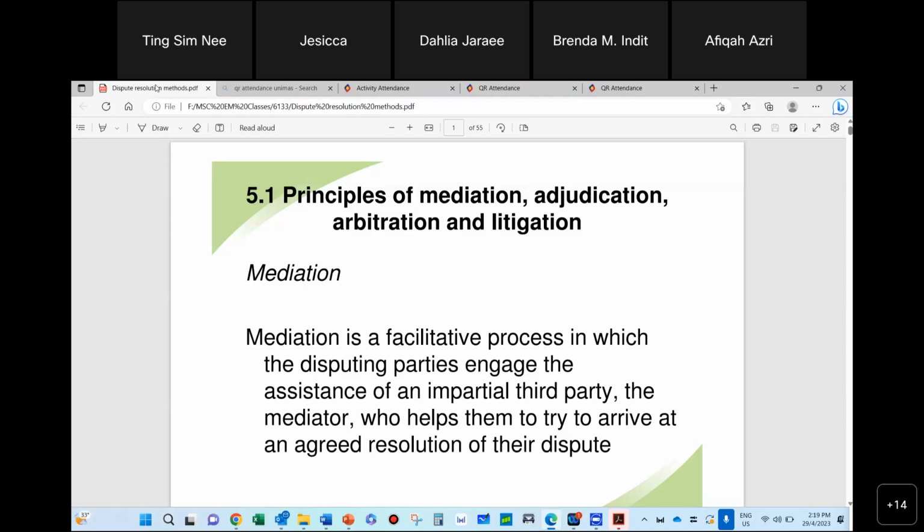Otherwise, the next step is you have to go for dispute resolution. And when you go for dispute resolution, the first effect is suspension of work. All work will be suspended until the dispute is resolved. Normally. So it's very, very hurting, it's a very, very headache. It's really a difficult thing to move into if you talk about dispute.